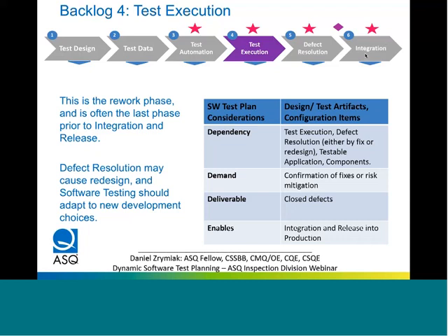And finally, the third type, go/no-go: everything has to be finished before you can get that magic green light, that magic go decision. So aggregating the multiple, and primarily the two critical ones are the test execution and the defect resolution. You cannot put something in that still has components untested, and you cannot put something in that has outstanding critical or high defects. So having those concurrently managed is